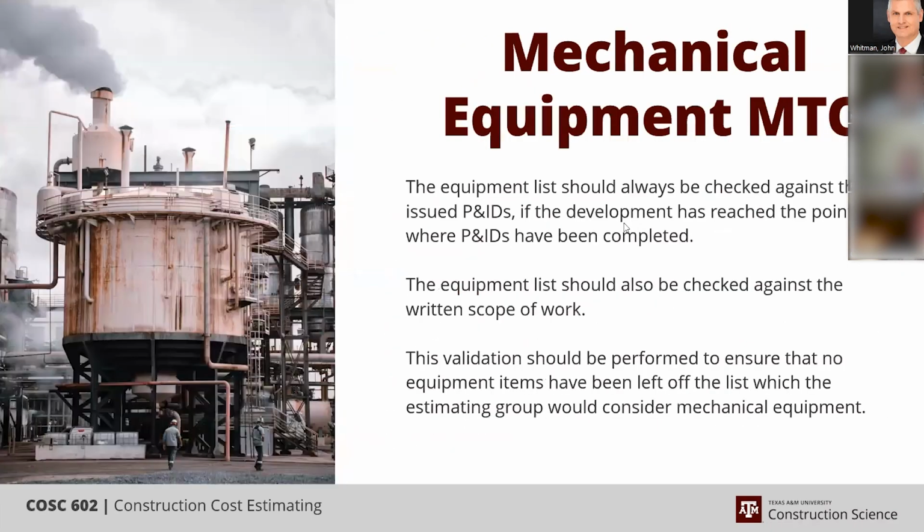But going back, if you have the time as an estimator, one thing I've always liked to do is check my drawing list, my pipe list against the PNIDs, and check my instrumentation and my equipment against the PNIDs to validate that what I've been given by engineering is accurate. It matches.